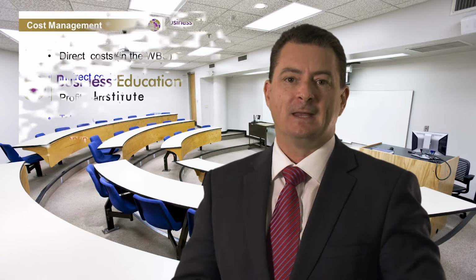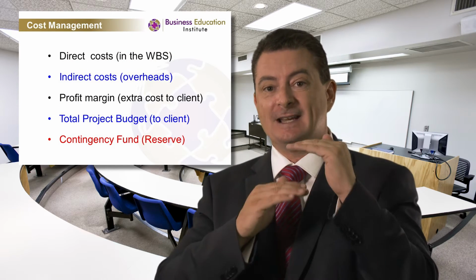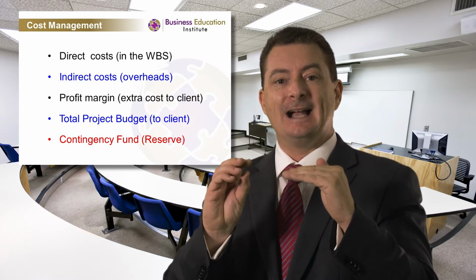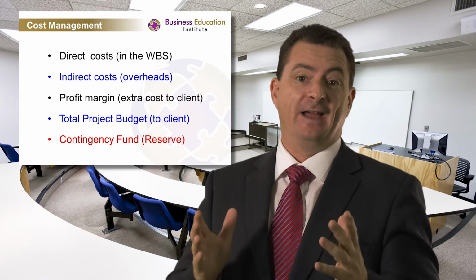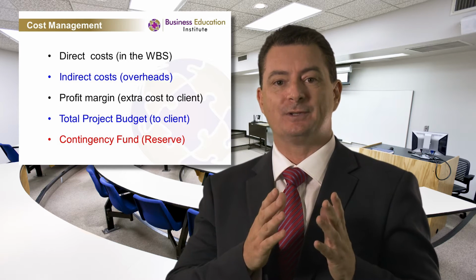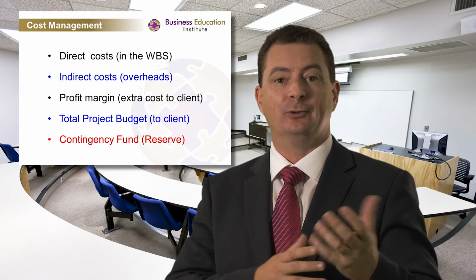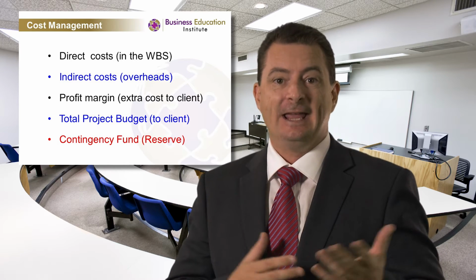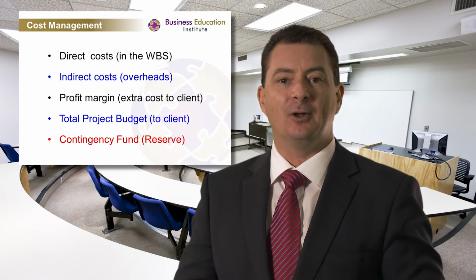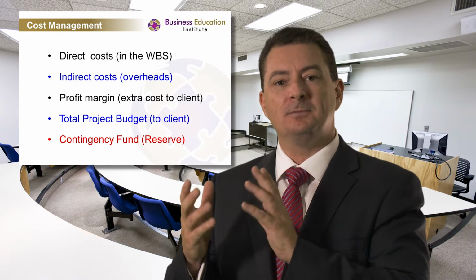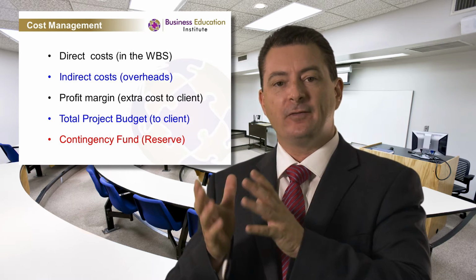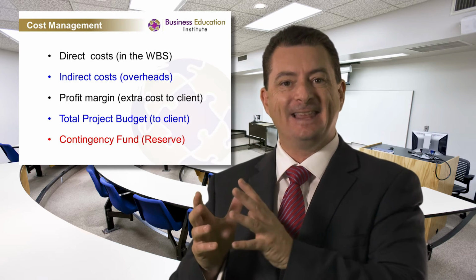Go back and get it absolutely clear on what the deliverables are, then the work breakdown structure becomes far easier to do. The next part is looking at cost management. See, the work breakdown structure for each task item, we can then allocate it a cost. In fact, we can allocate the cost of human resources, both internal and external, internal meaning staff, external meaning contractors or suppliers, but also equipment, materials and consumables. So you've effectively got the human resources and the other.